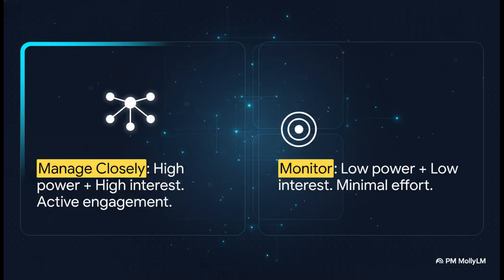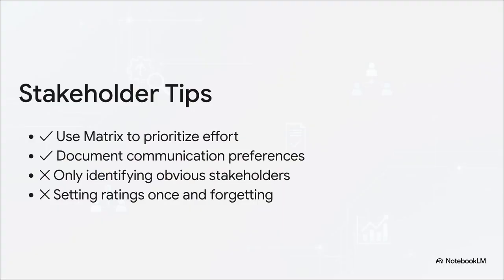When you look at the matrix, the difference in strategies is pretty stark. On one hand, you have Manage Closely for your high-power, high-interest folks. These are the people who need active, frequent, face-to-face management. On the total opposite end, you have Monitor for low-power, low-interest individuals, meaning they just need minimal effort and general updates.